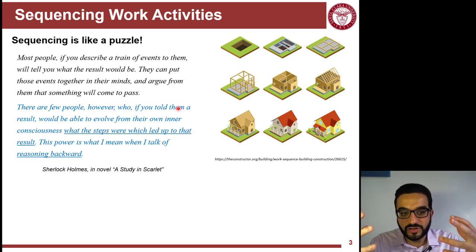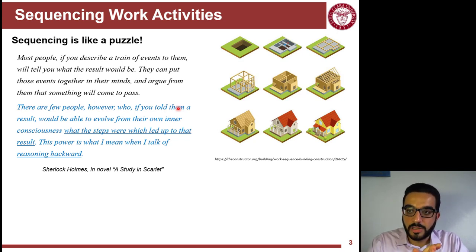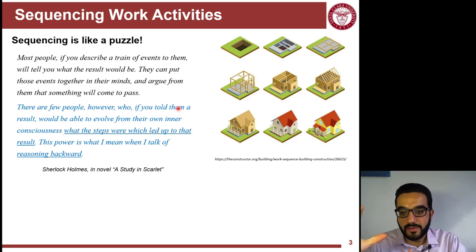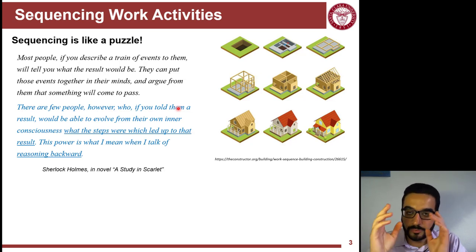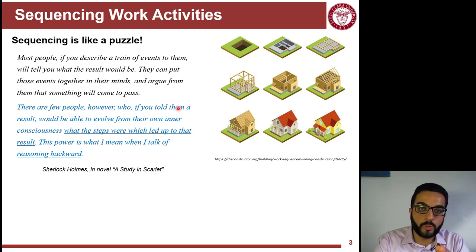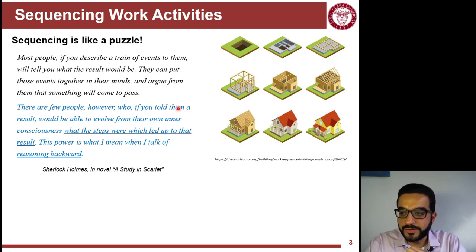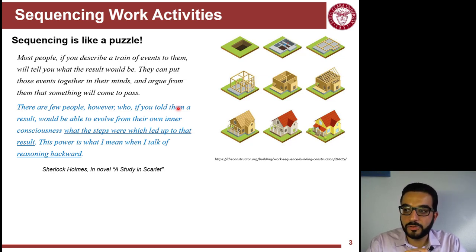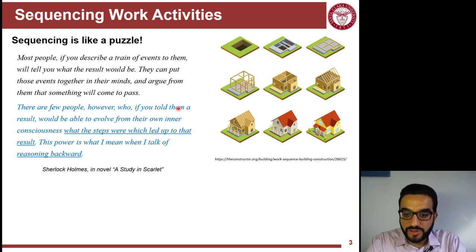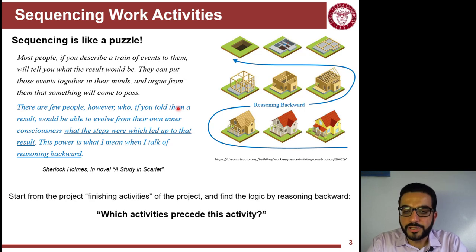It's really challenging for people to use backward reasoning — not negative, just a different way of thinking. When you have a set of plans for scheduling, you backtrack and rewind your visual representation of the building to see how things will be put in place before each point. This skill comes with practice; you won't be able to do it right away. You have to look at a project and start putting a schedule together yourself. Backward reasoning is the key to developing the sequence.